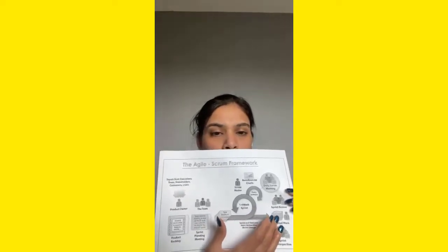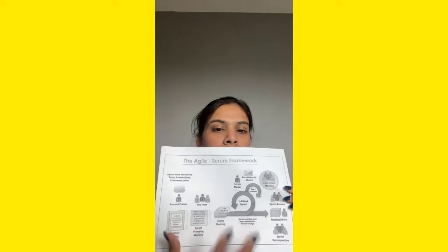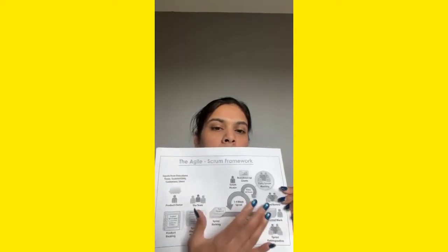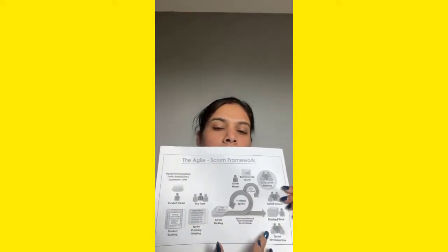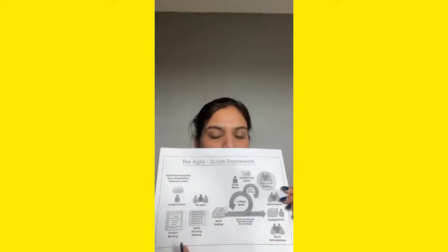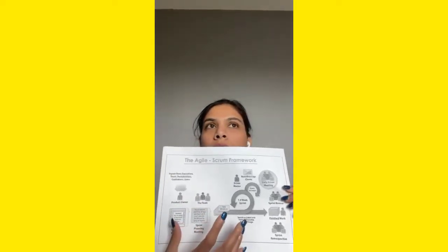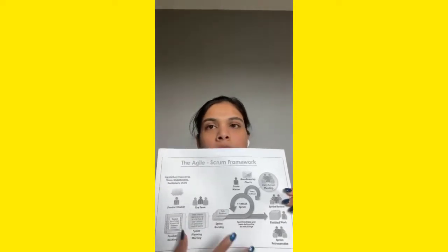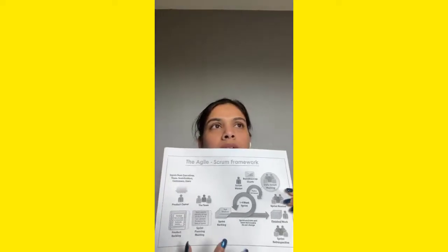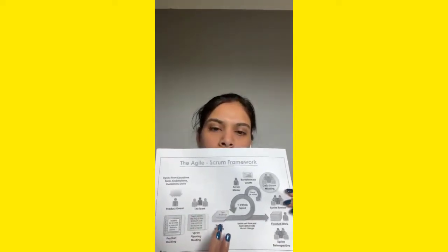At the end of the sprint, the review is done by the stakeholders, asking them what they have desired, what kind of result they have, a product they have desired, how it has been built, and what they are going to build further. Then a sprint retrospective is also conducted, where the team comes together and discusses inspection and adaptability, what improvements need to be made further, and how they have been working together, and the outcome of the sprint retrospective is added to the sprint backlog.